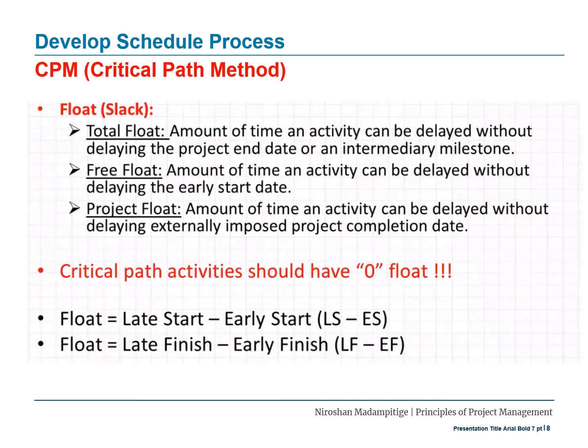The formula used to calculate the float is given below. There are two formulas that can be used. First one, float equals late start minus early start. The second way of calculating the float is subtracting early finish from late finish date.